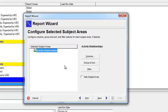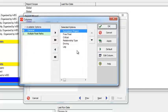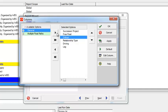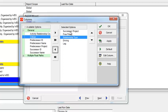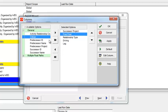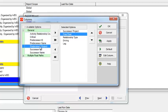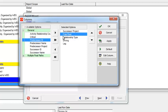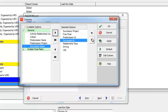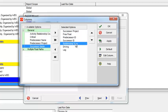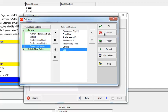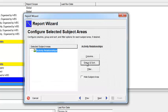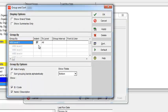Click Next. From here, in the columns, select what you want. You can add: Critical, Successor, Project Free Float. You can also add Predecessor ID and Successor ID, Relationship Type, Driving, and the Lag.